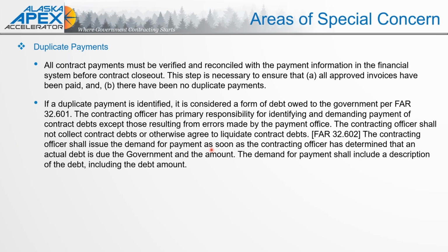So again, when you receive multiple payments under one lump EFT transaction, it is really important that you as the contractor have done all your due diligence to report any, and then if that is the case, make sure you've documented it and documented the response of the agency as well as how they're going to handle that overpayment. And those documents absolutely should be in your contract closeout file, because you don't know when the agency is doing their paperwork to close that out and may come back to you with questions.